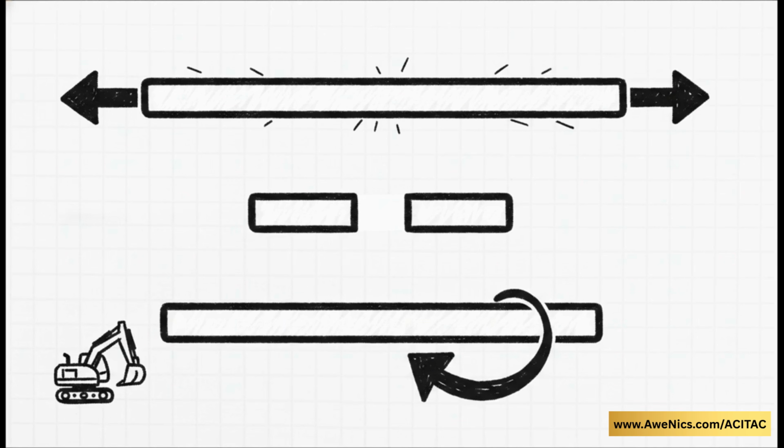First, stretching durations. For example, ordinary rock excavation took longer because we had fewer resources assigned to it each day. Second, splitting tasks. The earthwork activity was actually split right down the middle. Work started, they stopped to let a resource go handle something else, and then resumed it later. And finally, shifting activities entirely. Tasks like embankment construction and drainage work were just picked up and shifted entirely to a later date, just waiting for their turn with the JCBs and the dumpers.